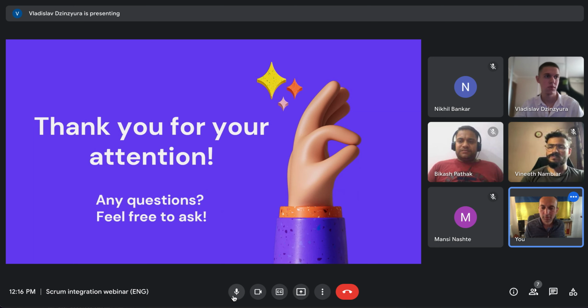So, for example, I add some things into the backlog, and instead of having a sprint properly, like in Scrum by the book, we're just making decisions on a daily and weekly basis in Slack about which things are being developed right now. At the same time, we keep the time boxing and iterations principles. So we know, okay, the middle of the month approaches, we need to do our monthly release. That principle, I believe, is more important.